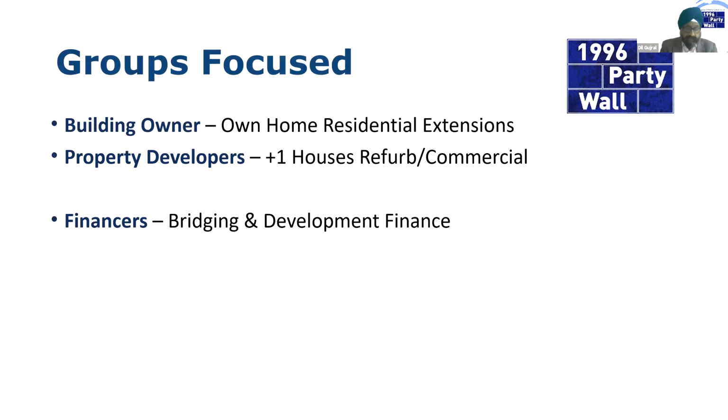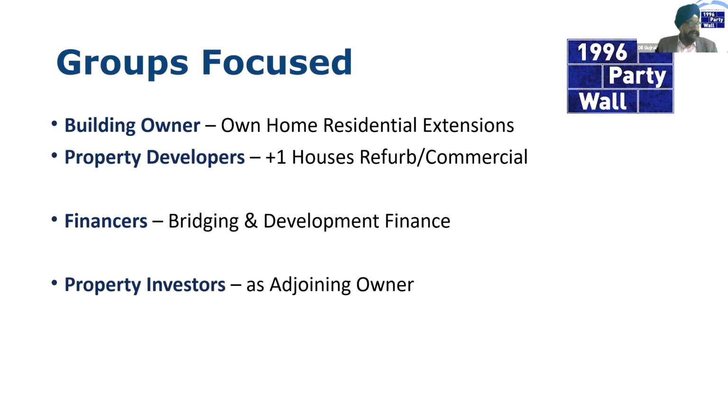Next group that needs to be mindful of the Party Wall Act are finance and development companies, whereby they're lending money for developers to develop sites, and because the developers or the builders are forgetting to do the party wall process, it means that the repayment of the loan can be in jeopardy in terms of overrunning delays and returning the finance. So financiers and developers need to be aware of the Act.